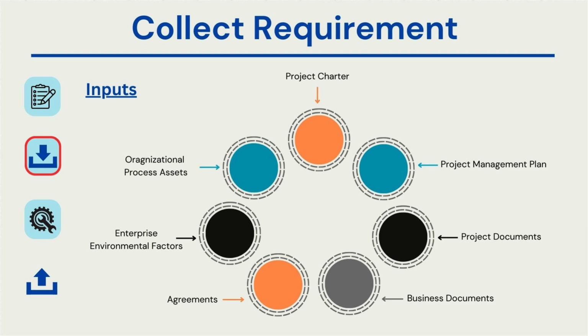I would also need to refer to business documents, and one of the most important documents would be the business case. The business case will help me understand the background, context, and how this project is going to benefit my customers. It also provides information about investment, impacts, and other relevant aspects. Most of the time, there is vendor engagement on the project in some capacity. I would need to review the agreements, as they will give me an idea of the scope, impact on this project and the kind of contribution the vendor would have.